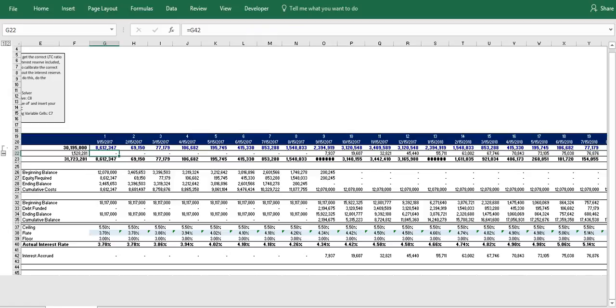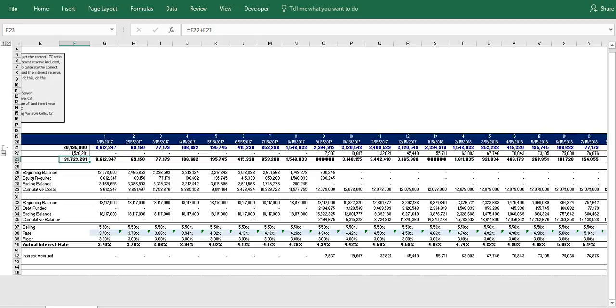Okay, so now we have our accrued interest projections and we cycle them back up top here and we add it to the cost schedule. Okay, and so now we can see that our true costs currently are $31.7 million with the variable interest reserve of $1.5 million that should actually change as we calibrate this model to figure out our true loan to cost ratio.